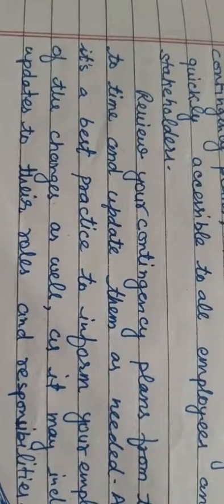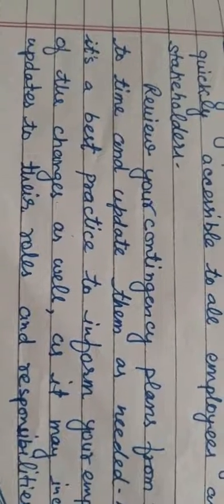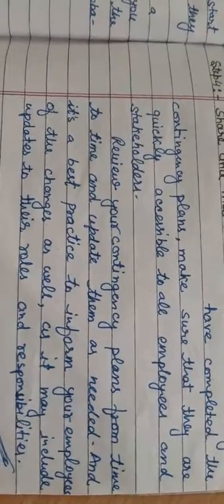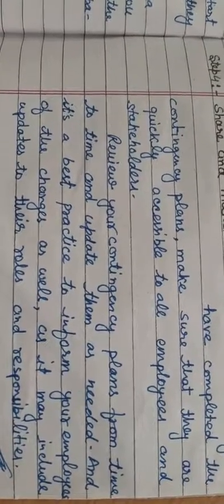So in today's video lecture, that's all. This was your last topic of the syllabus, and from tomorrow's video lecture we will start revision from the first unit. Students, remember these four steps: first, list down the key risks; second, prioritize the risks based on their impact; third, create a contingency plan for each event; and fourth, share and maintain the plan. I hope this topic is well understood. If you have any doubts, you can contact me. Thank you, students.